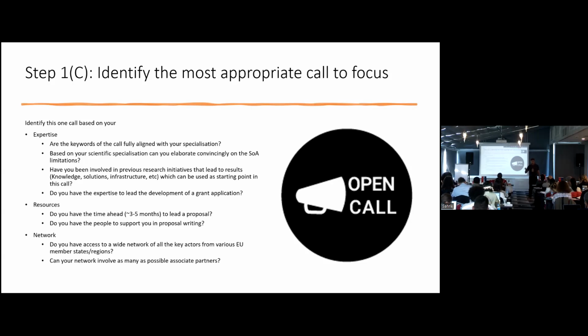That core topic requires you to make sure, with your researchers from 3 or 4 universities, to go through and identify what are the state-of-the-art limitations. What is a limitation? What hasn't been achieved so far by the research community in your area. Limitation 1, limitation 2, limitation 3, or limitation 4. So your objective will actually be to overcome those limitations. But in order to show how you're going to overcome them, you need to identify them. If you cannot identify those state-of-the-art limitations, then you stop there. This call is not for you.